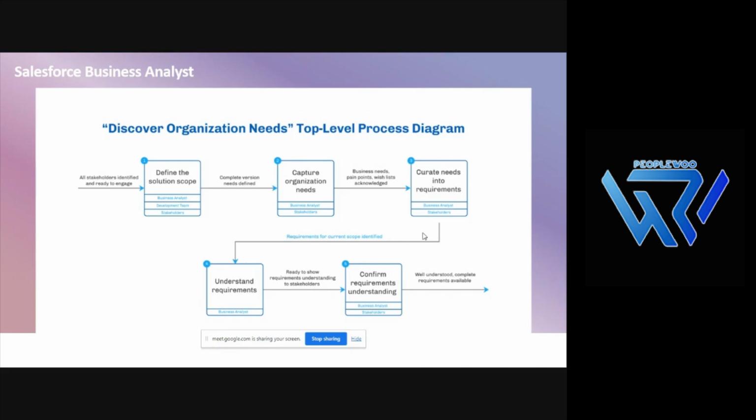So with this cycle, you would have understood that a BA is not only related to requirements, whoever is responsible for gathering the requirement. They provide hand holding throughout the software development life cycle. They get the requirement, explain it to dev, and if there are any questions or queries from the QA, they address them. In UAT, we provide test cases for the business users to perform the testing, and once the UAT is done, we are responsible to get that sign off. Finally, we hand it over to the release team. So we are involved in the entire software development life cycle, right?